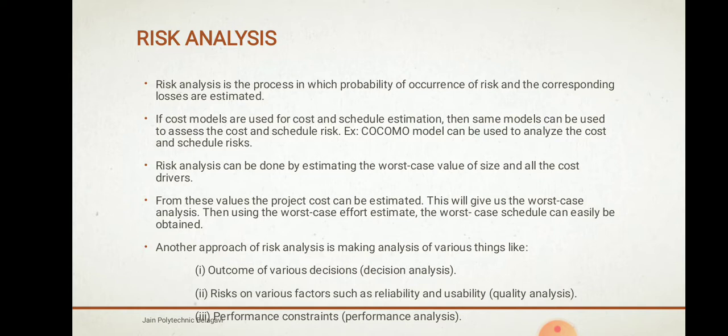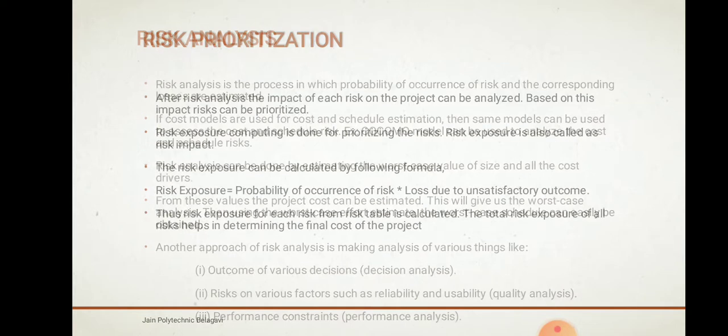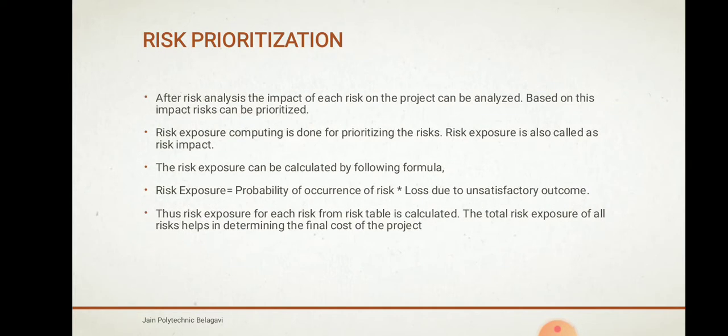There is another approach for risk analysis: analyzing the outcomes of various decisions and risks on various factors such as reliability, usability, and performance constraints. After analysis, we prioritize the risks — that is risk prioritization. Once all risks have been analyzed, the impact of each risk on the project can be determined.